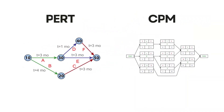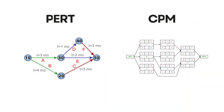Unlike other project management methods that might seem similar, like PERT — Program Evaluation and Review Technique — the critical path method uses a single time estimate for each activity, making it more straightforward to apply in real-world projects.